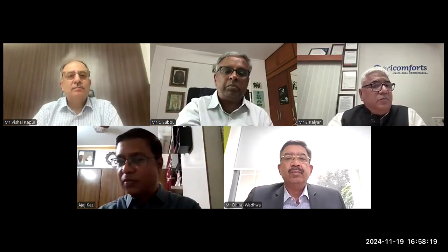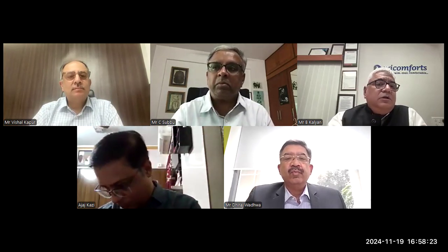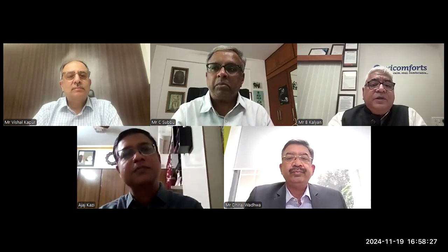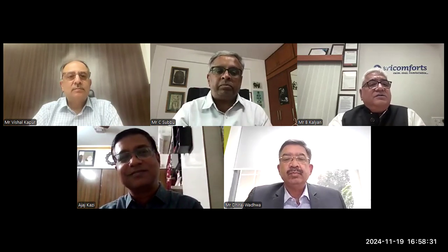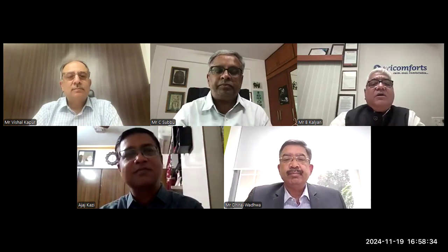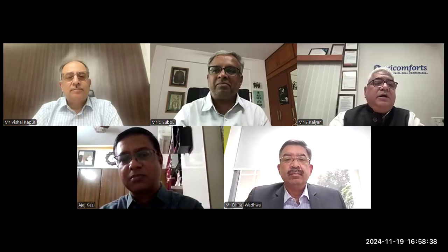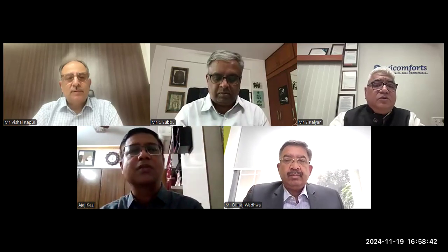Also, many times the project is on the drawing board for 3 months, and execution is given one month. So that is also a problem. And in India, we have a lot of changes till the last minute, and these things are pushing the project delay. And finally, the last casualty is the commissioning. So this is what is happening.